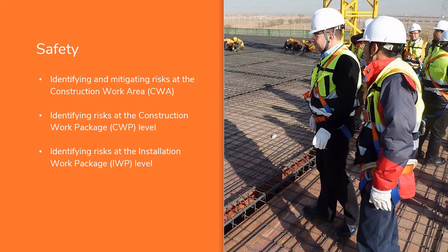And the pumps that are used to circulate the water in the tailings ponds are subject to being clogged. And when they clog, even if it's the middle of winter, the water recirculates, it gets hotter and hotter and hotter. And if somebody isn't aware of that risk, they may uncouple the pump and find themselves scalded.